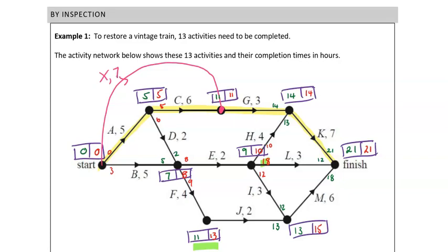Okay, so working backwards from here, yes, we would have a forward scan, we would have a 7 coming in, but 11 would still come into the box, so that forward movement would stay the same. Our latest starting time working backwards, from the red 11, take 7. Going backwards, we would have 4. So our latest starting time, so that there is no delay, would be 4 hours.